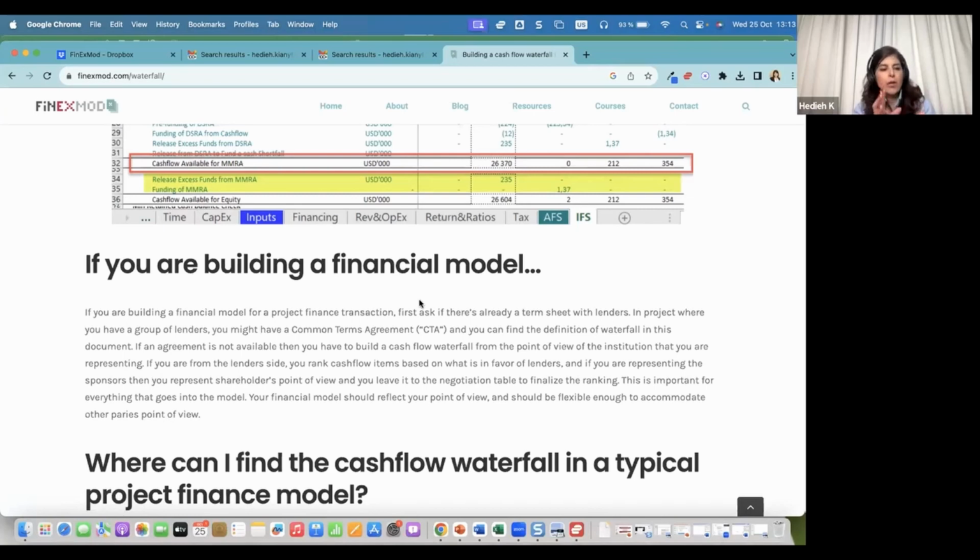And after that they say, okay, out of your 10 million costs, we accept 9 million, 9.3 million of it, as actual project cost. So we can put that as actual project cost in the budget. So they will be reimbursed, right, as equity. It's equity. So either the sponsors who come in post financial close paid the developer and bought the shares from the developer, and now they are working as equity sponsors during construction, or it is the same developer who developed the project and is now continuing as equity sponsor during construction.